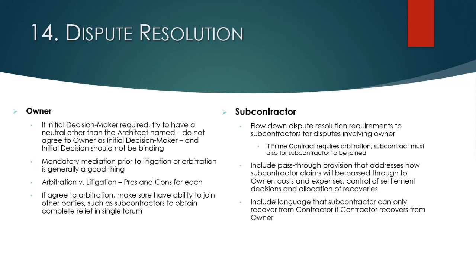With litigation, you're going to have a judge and a jury that may or may not be good. You're also not going to be paying for some of the things that you would be paying for in arbitration, and you have rules in litigation: court rules, rules of procedure, rules of evidence, and the ability to appeal decisions that you don't like. You don't have that ability in arbitration unless you write it into your contract.